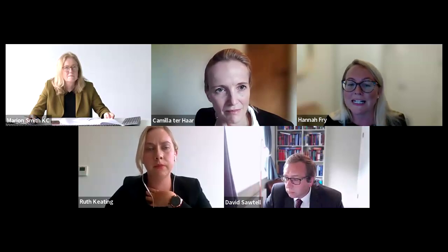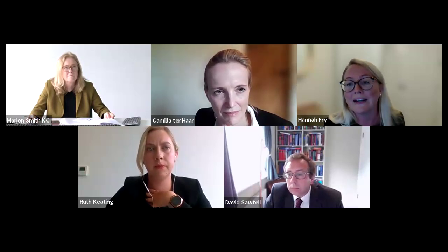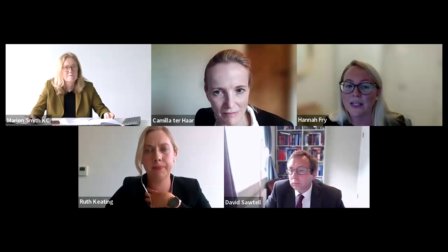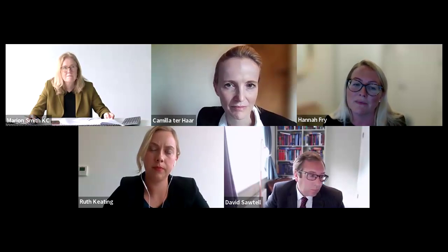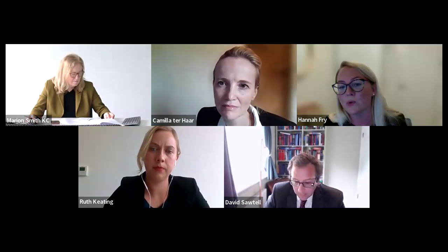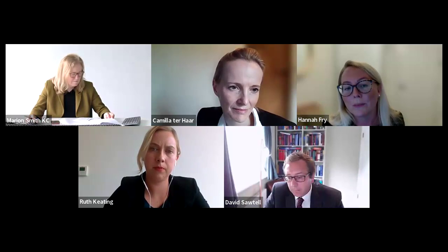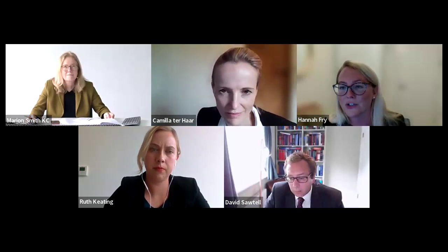However, the JCT makes clear other rights and remedies remain. For example, damages incurred by the employer due to the further delay can be claimed as general damages. So whilst it merely reflects the Supreme Court's decision, it brings welcome clarity and clarifies what the industry norm is now.